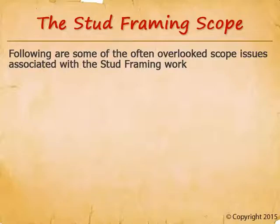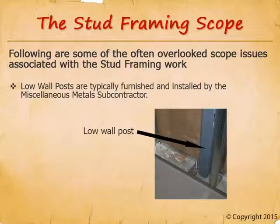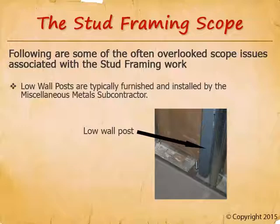Our first examples focus on often-overlooked scope issues associated with stud framing. Low wall posts are typically furnished and installed by the miscellaneous metal subcontractor and are a very common scope gap. They're used for freestanding walls that have no top support — low-height walls such as a 42-inch guardrail commonly need them. Both miscellaneous metals and interior stud framing are design-build trades, so low wall posts may not be shown on the drawings. General contractors often lose this contentious change order debate.